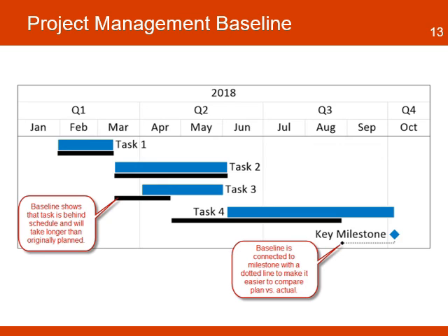As the project makes progress, the project manager will monitor the changes in scope, schedule, and budget against the baseline. For example, the project manager notices that there will be a delay in the delivery of some critical tasks, tasks 3 and 4, that will impact the end date of the project. He reviews the original estimates, the baseline, and comes up with a new schedule that avoids the delay in the end of the project. The project management baseline is a target baseline used as a planning metric against which the progress of the actual project performance can be measured.